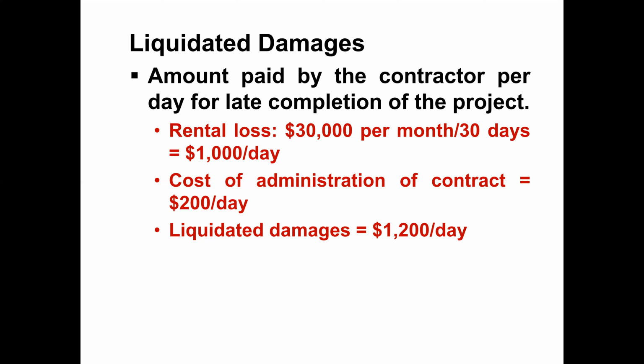Of course, these will be mentioned in the bidding documents, but this is the way they calculate the expected income from the project per day. So if the contractor completes the project late without any reason, the owner has the right to ask for liquidity damages. The contractor has to pay these to the owner for late completion of the project, per day.